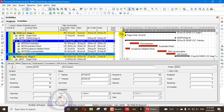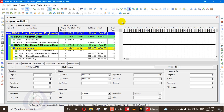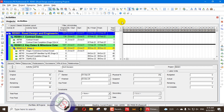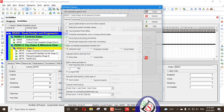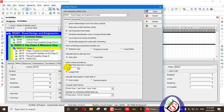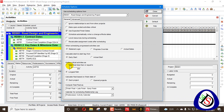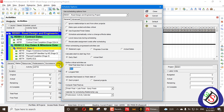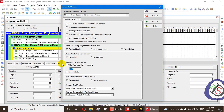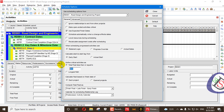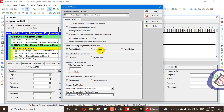So what are critical activities and how many types are there? What is the longest path? When we press F9 and go to options, you can see there is an option where we can define the critical path. Critical path is defined such that any activity having a zero total float is a critical activity.